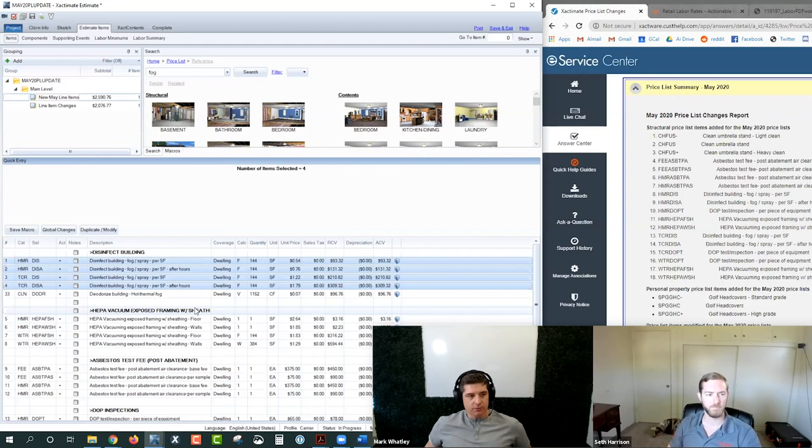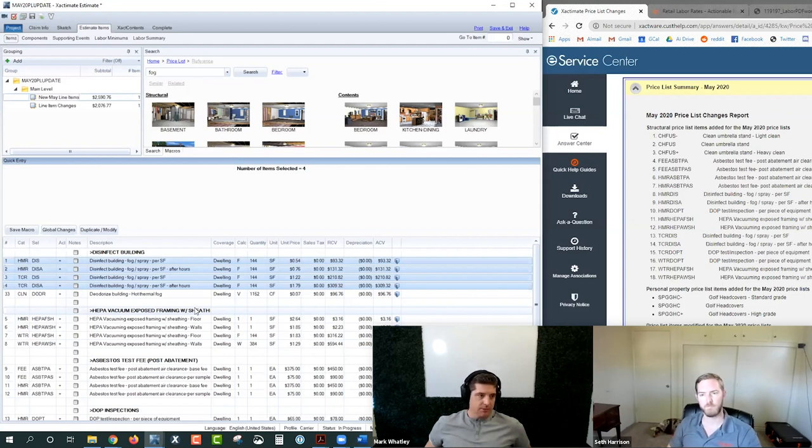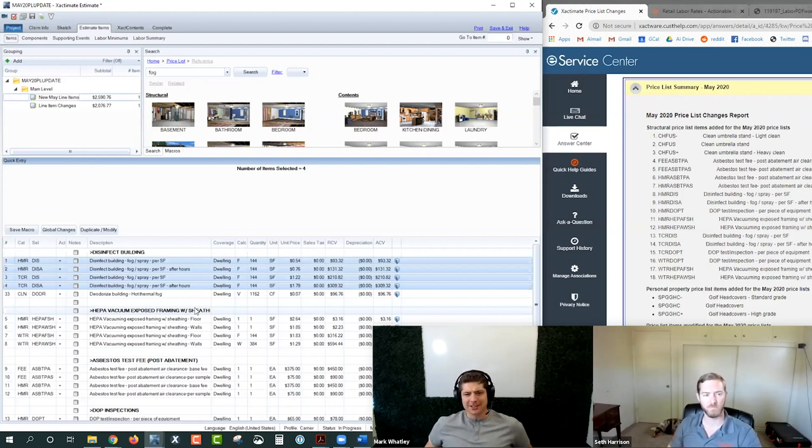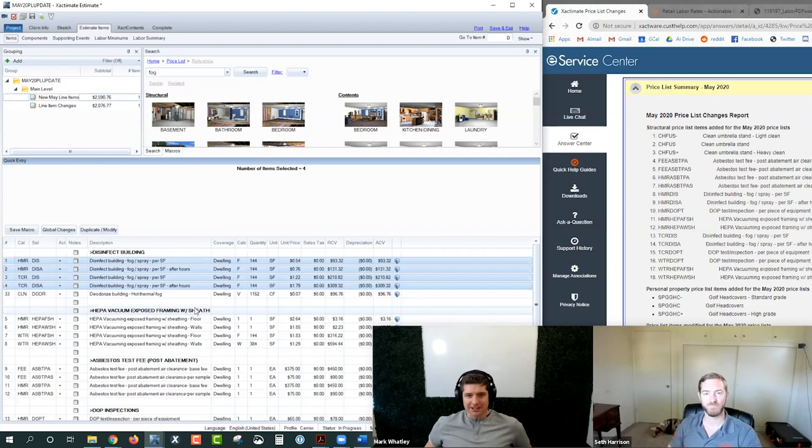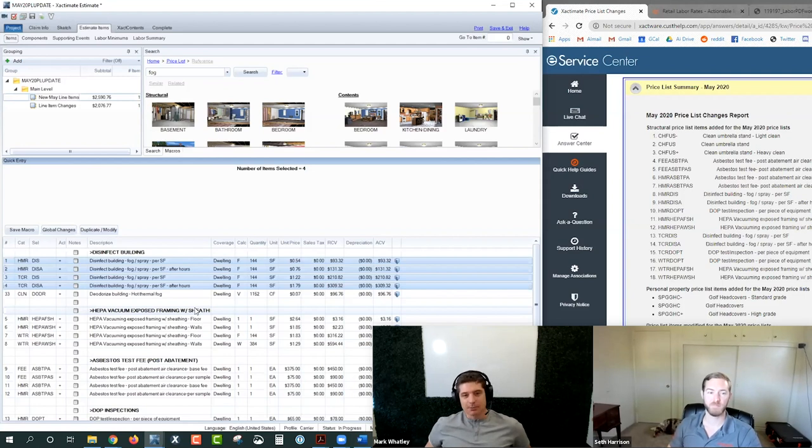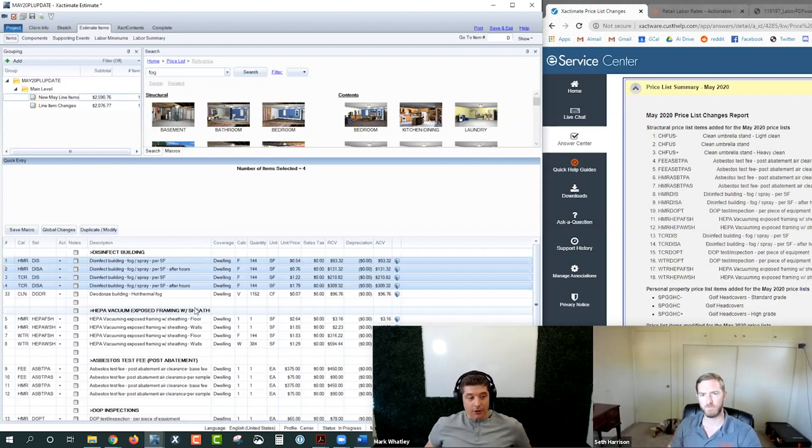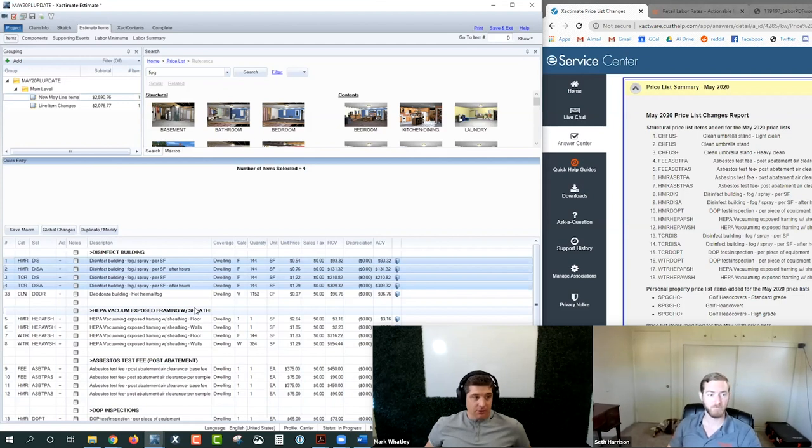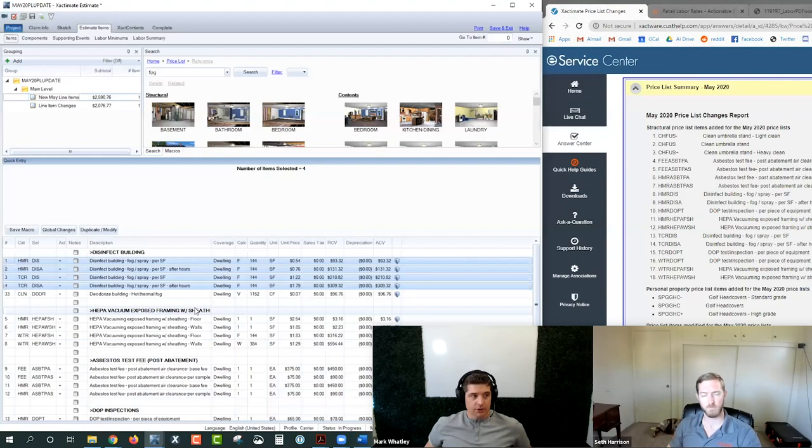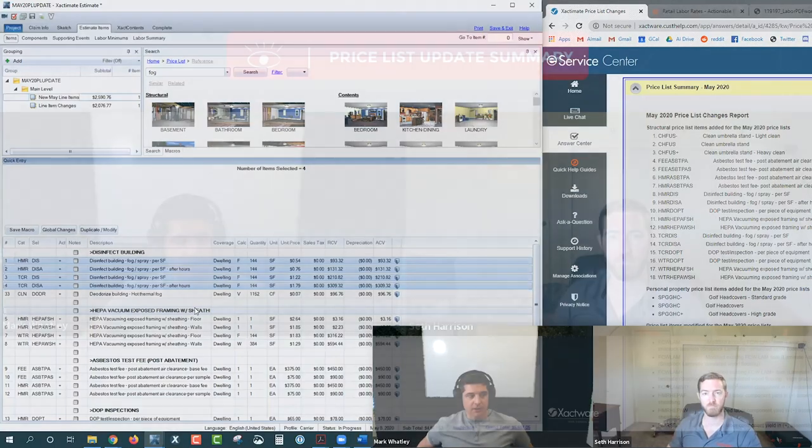So I think that was a clever way to really accommodate what the marketplace is asking for. And I'm alluding to the Delta, the line item that you have down there below the CLN DODR. This was done on a volume basis. And this is kind of born out of the whole mold is gold, early 2000s thing. Everybody was doing it based on volume. But for a number of reasons I don't get into, the square footage makes a heck of a lot more sense in a COVID environment. So I like that move makes a lot simpler. You know, one might look at that pricing and be like, Oh my God, it's astronomically more. And I'm so sure that somebody is going to do that in some estimating department. Look, boss, look, look, it's like 10 times as much, not recognizing that it's done by foot, as opposed to volume.